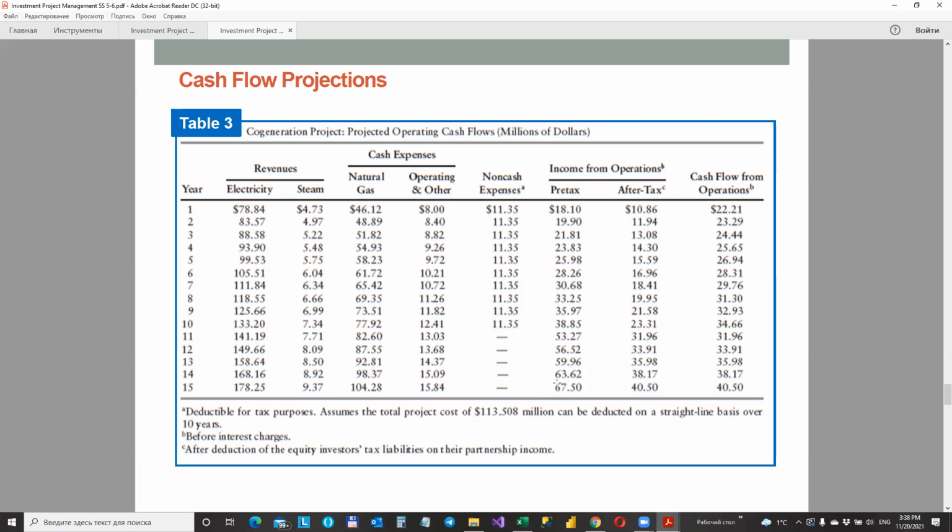Why do you need 100 million? Because we have this same depot constructed in another city. No, it's not a good approach. You should go into detail and explain why it will cost 100 million. Maybe it's more or less. Both outcomes are unfavorable for a credit institution, if we have extra expenses or lower expenses. It all goes to inefficient financing.